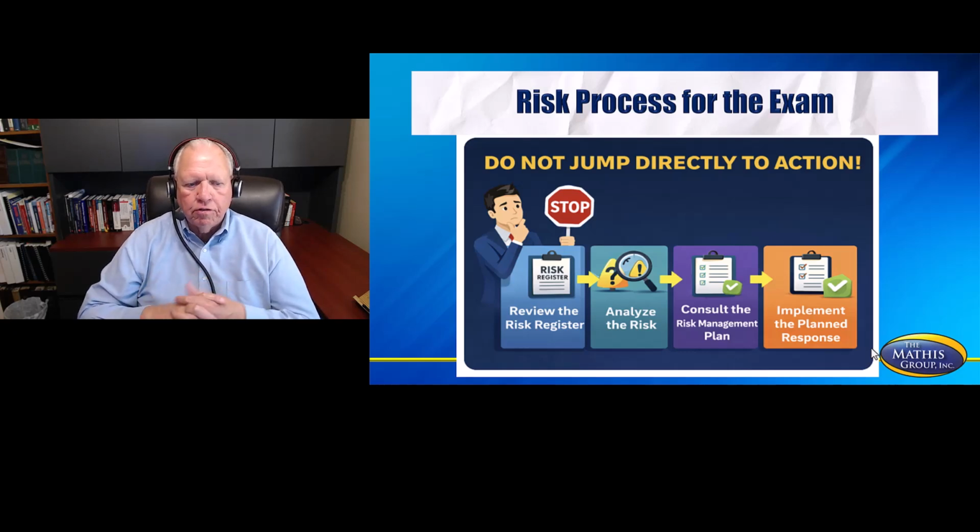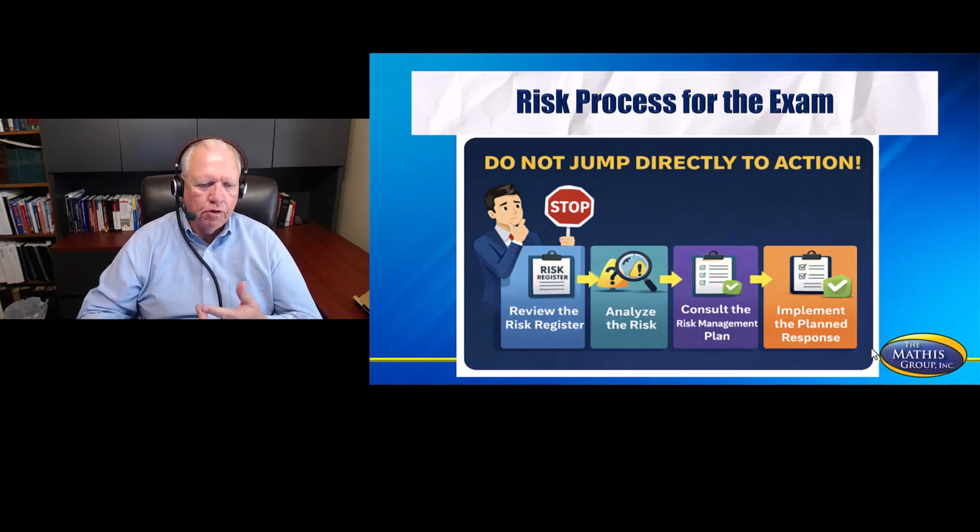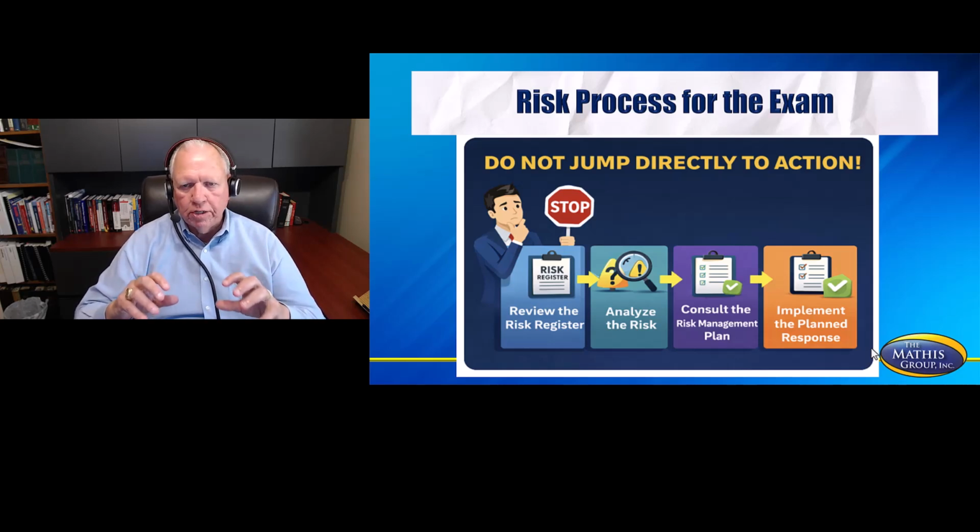As you look at this slide, it's going to talk about the risk process for the exam. Notice it's giving you several steps here. Review the risk register, analyze the risk, consult the risk management plan, and then implement the planned response. This reeks of traditional project management.